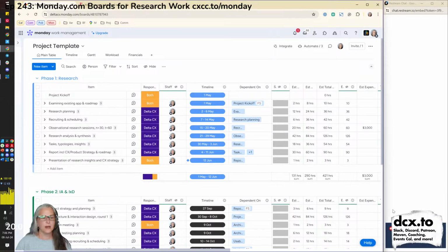I can't start the research until we've had a certain call, or sometimes this first thing says, let's do a knowledge quadrant exercise, or I need to check out your existing stuff. That means there's a dependency. One can't move on without the other. So you use the dependency column to say, this thing can't start without this other thing.